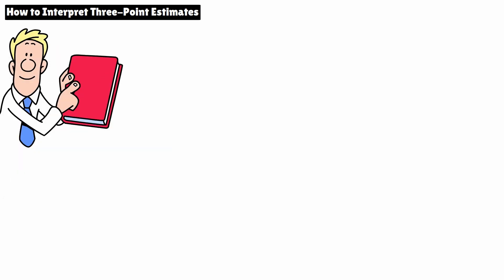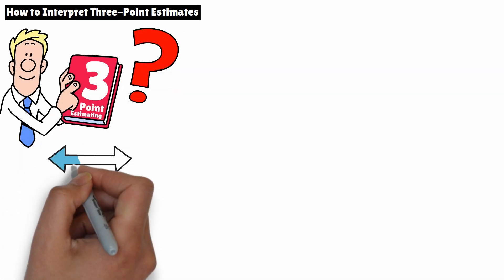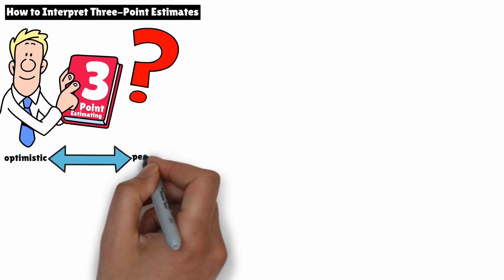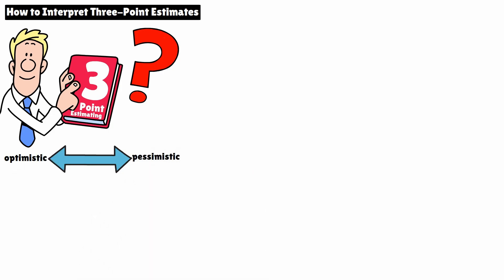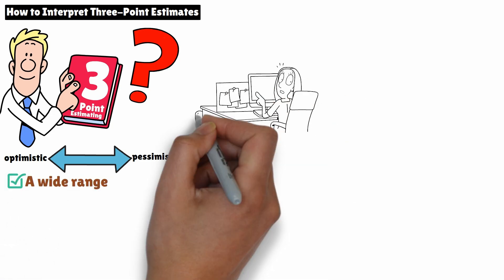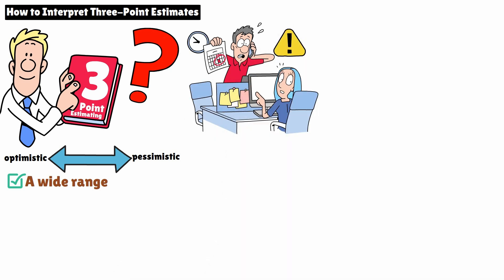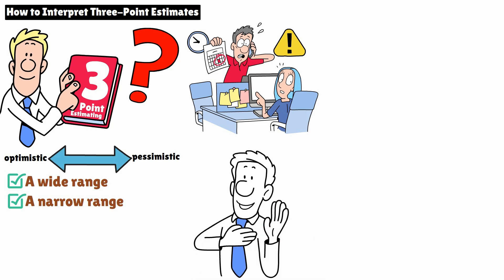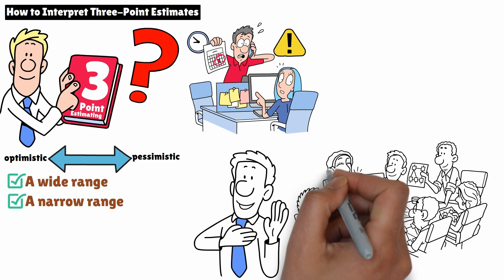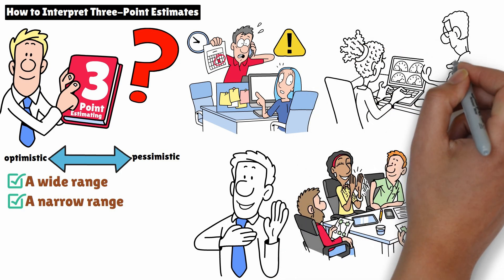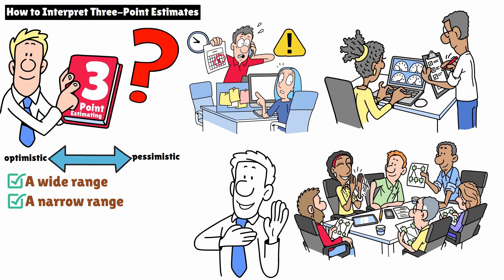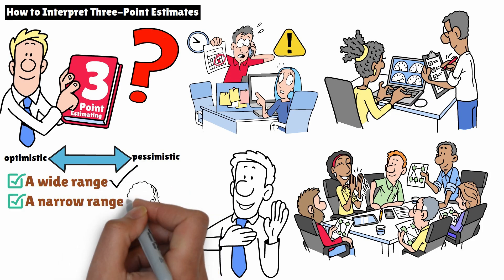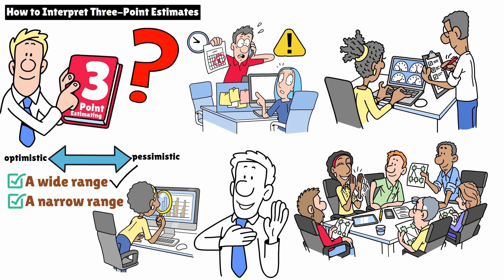Once you have your three-point estimate, how do you interpret it? The key lies in the range between your optimistic and pessimistic estimates. This range tells you a lot about the level of uncertainty or risk involved in the task or activity. A wide range between the optimistic and pessimistic values indicates high uncertainty — you should be cautious, as there is a greater chance that things could go wrong or there are unknown factors at play. A narrow range suggests higher confidence in the estimate, with less variability and less risk. If you see a wide range, you might want to plan for additional contingency or investigate the risks further.